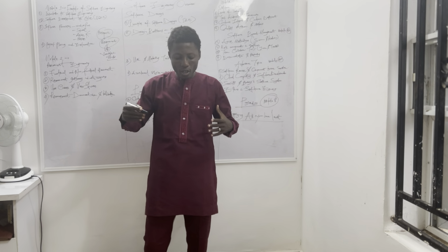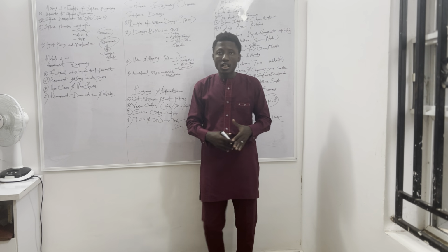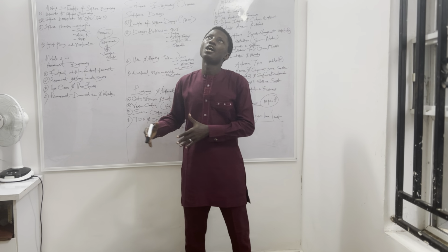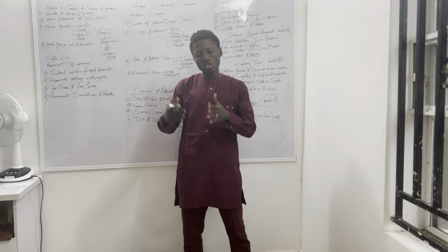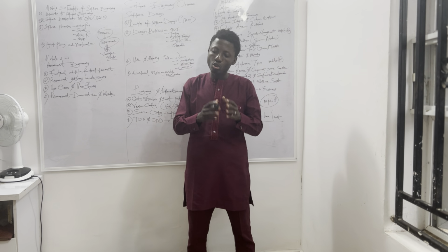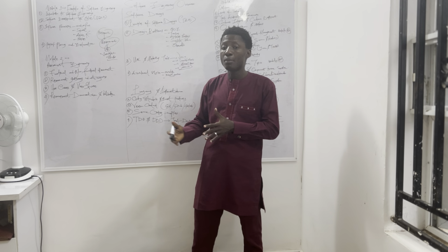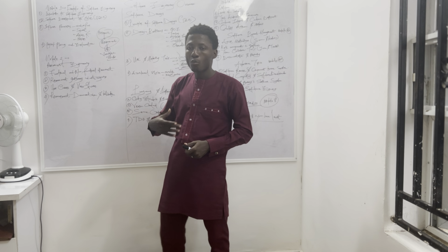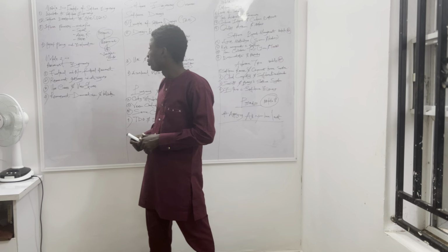Estimation is like you giving a timeline of when the project will be completed. You understand? You're going to give a timeline, and you're going to break a lot of your tasks into smaller units and group them. For those that are supposed to be completed together, group them together. For those that will be completed later, you can put them in your backlog. So you are going to estimate how long you need to complete and what you need to get to the market, if you want to get to the market as soon as possible.